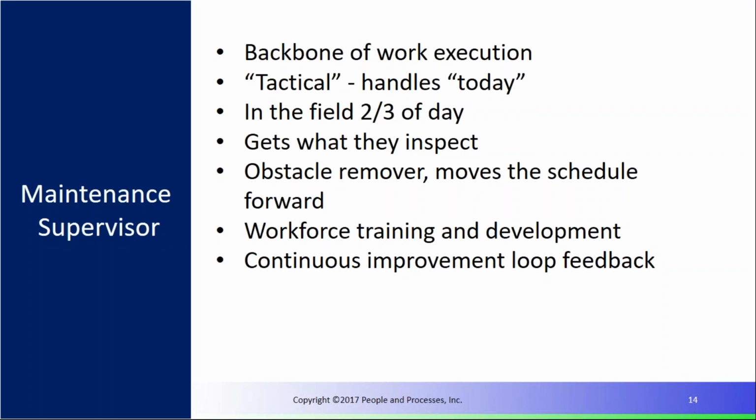And so if we put out, for example, 400 hours worth of work on the schedule, then that supervisor should be doing everything they can to make sure that that 400 hours worth of work gets accomplished in the current week. Otherwise, it's going to show up in the next week's schedule, in the following week, or whatever the case may be. And the challenge is they have to get out in the field. And you get what you inspect. You stay behind the desk, it's not necessarily a great thing.